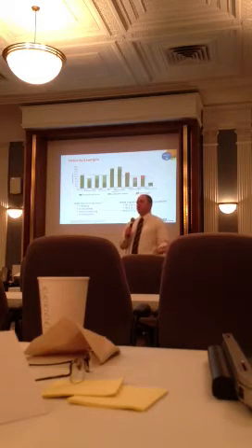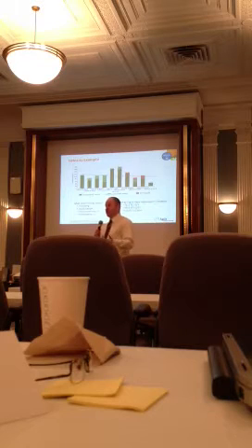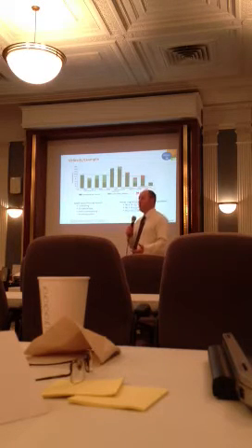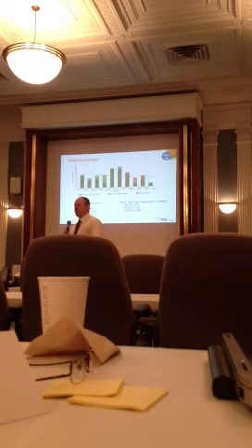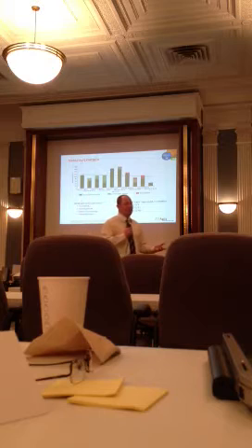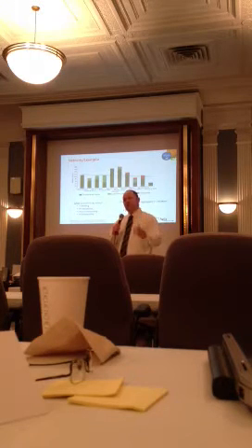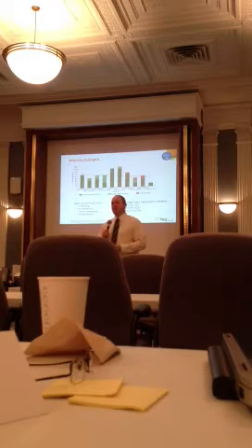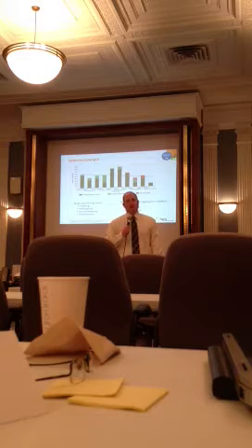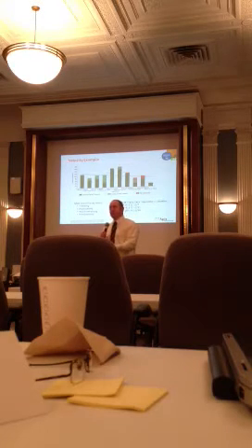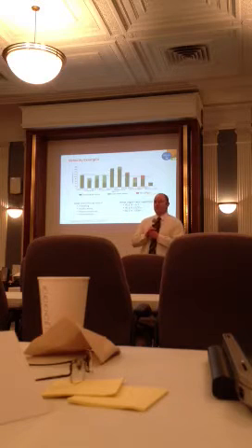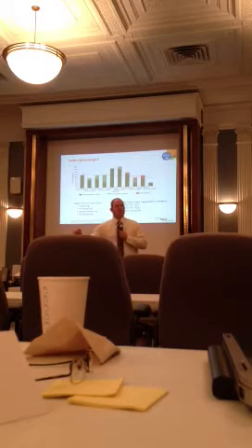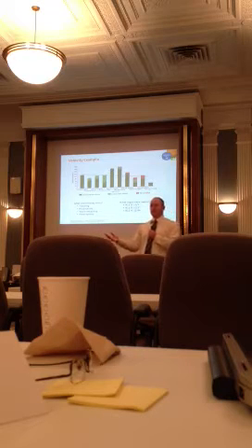For example, 2 years ago, HTML5 was just brand new, right? We recognized the fact that HTML5 is probably going to be pretty valuable to know, and in 6 months, there's going to be a lot more web-based work that could now be on mobile through HTML5. So we created this Skill Factory Scrum team and said, you're going to focus on HTML5 work, and then they would take user stories from all of the Scrum teams that were related to HTML5 work so that they could learn that skill as quickly as possible. Okay? So they weren't responsible for owning a product. Instead, they were responsible for ramping up on HTML5, or a new skill. Then 6 months down the road, they have all this experience with HTML5. We can take those 5 people, pop them off, put them into 5 different product-based Scrum teams, and they can ramp up everybody else. Okay, make sense? That's the purpose of that team.